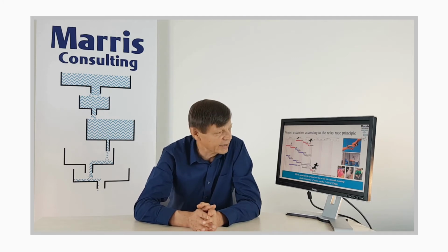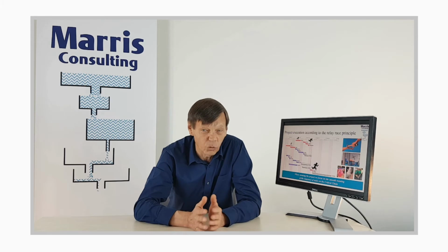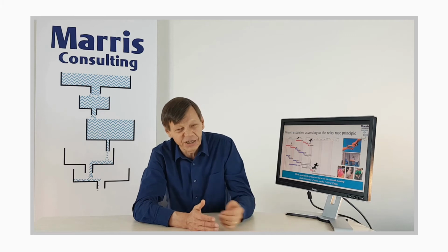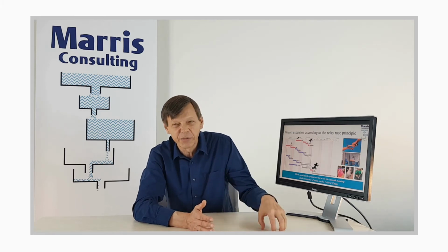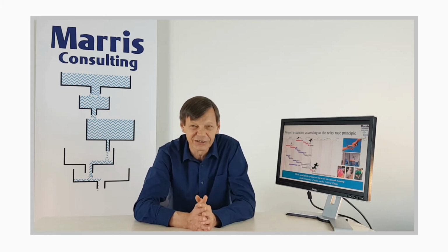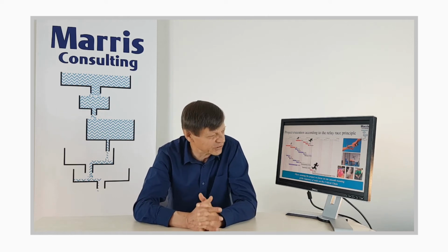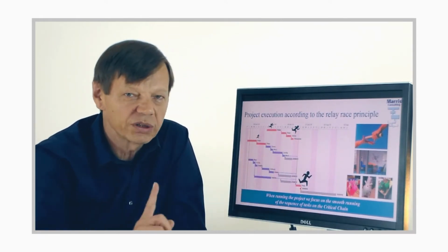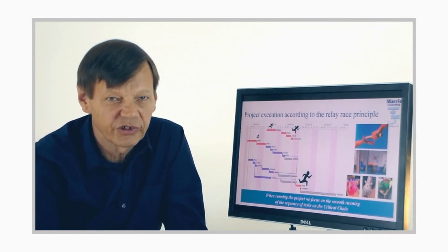They can therefore work there in the best possible conditions. And for the more extreme cases that we've seen, they have to leave their mobile phones outside, so they're really perfectly concentrated. And that works well. The critical chain for a project is only at one particular location at any one time.